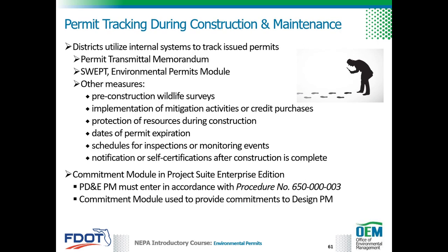FDOT districts utilize internal systems to track permits issued for projects. They use the Permit Transmittal Memorandum to distribute permits to FDOT personnel and offices, such as the project manager, program management, construction, maintenance, and specifications. Permits are made available to potential contractors via FDOT's File Transfer Protocol site.